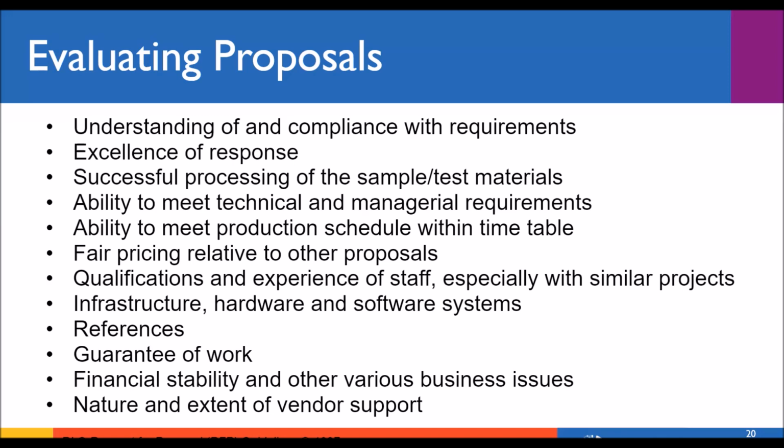Their ability to meet the technical and managerial requirements. Do they have the infrastructure? Do they have the equipment? Their ability to meet the production schedule within your required timetable. Can they actually do it in the time frame allotted? Is the pricing fair and relative to the other proposals? So again, is this within the middle of the pack, or are they super cheap, or are they charging an arm and a leg?